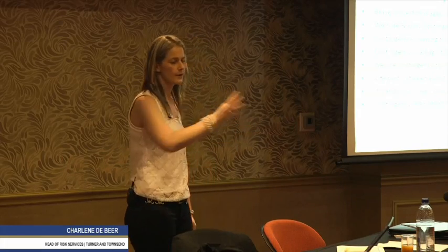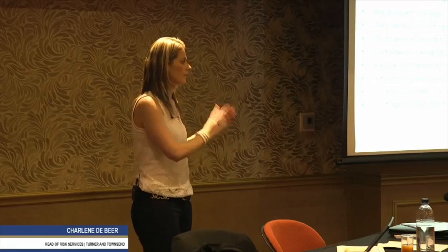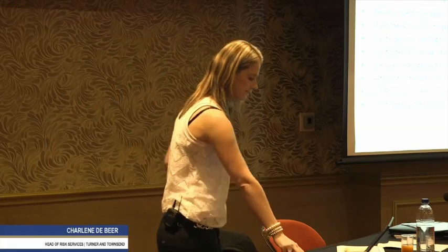If anything outside of that happens that we never identified as a risk or quantified, we're actually supposed to go to the board or to the investors or to the shareholders, or if I'm the contractor, go to the client and say, look, this risk is being imposed on me, this is going to happen, I'm not going to have money, how are we going to pay for it?